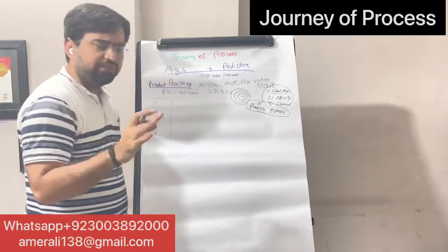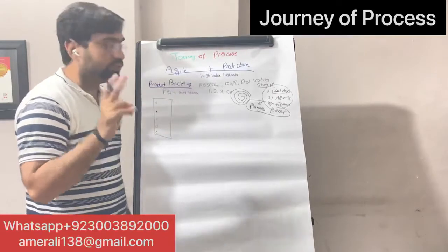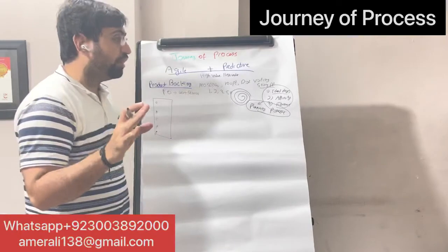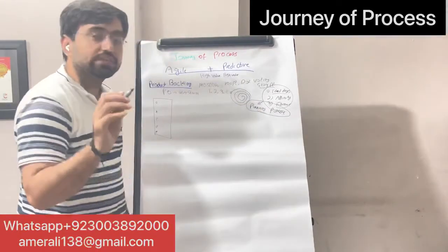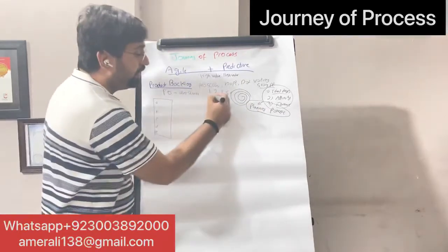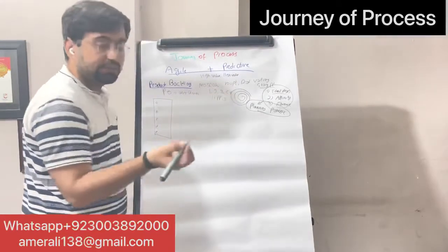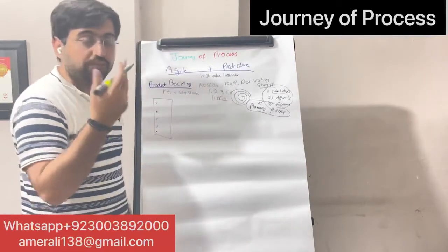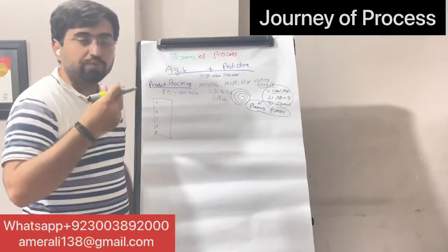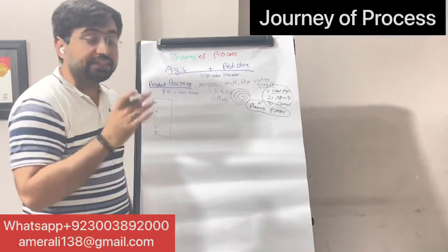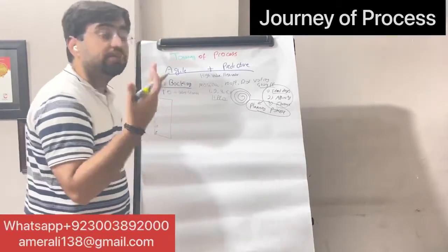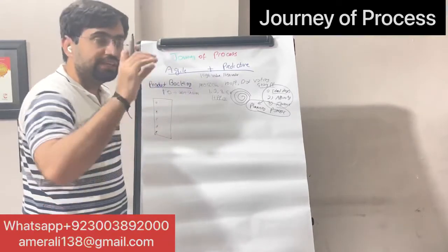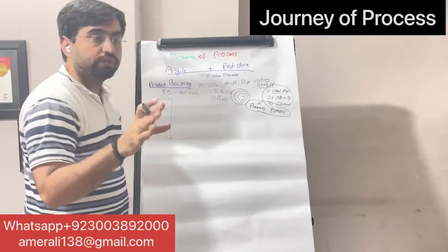Planning poker is a very effective technique, but there is a downside to it. Whenever you are using planning poker, if you have the highest paid person in the office, or a senior person in that team, then after round 1, people will try to move towards what he said. They think he must have said the right thing, so they will try to move towards him or her. This decreases the effectiveness of the process.